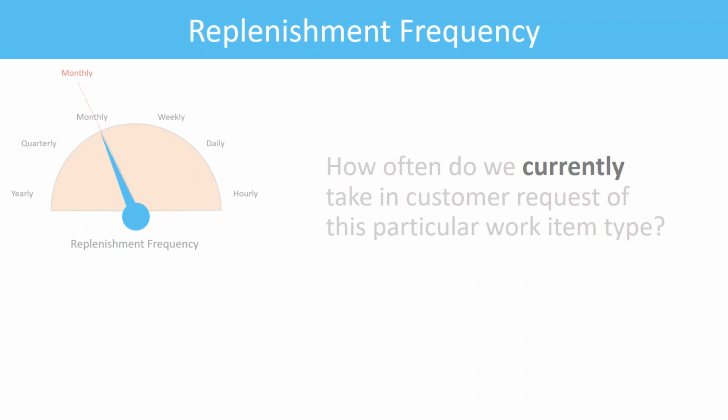Well, that's when we look into metrics. Look at your historical data and see how often we're replenishing. It's not about how many items we replenish each time we're replenishing, but it's more so how often we're doing this replenishment. Because when people come into Starbucks, maybe they're just ordering 1 cup of coffee, or maybe they're ordering for the entire company 80 cups of coffee. It doesn't matter how big the load is, it's about how frequently we're replenishing the order.